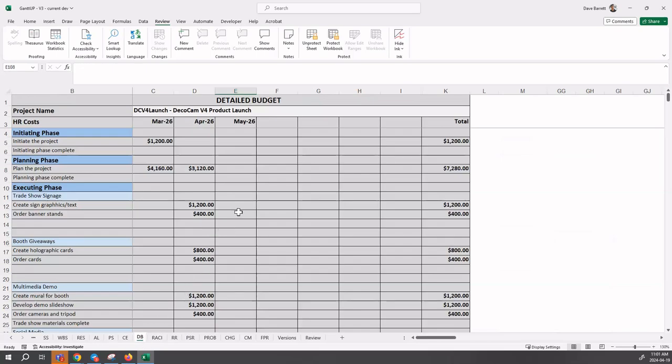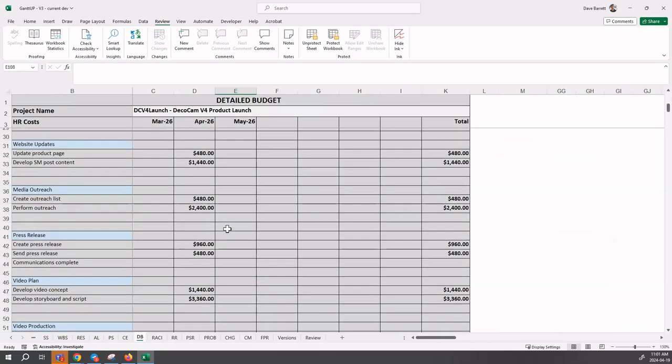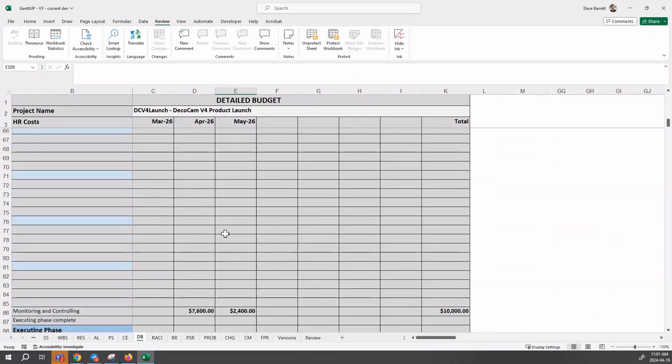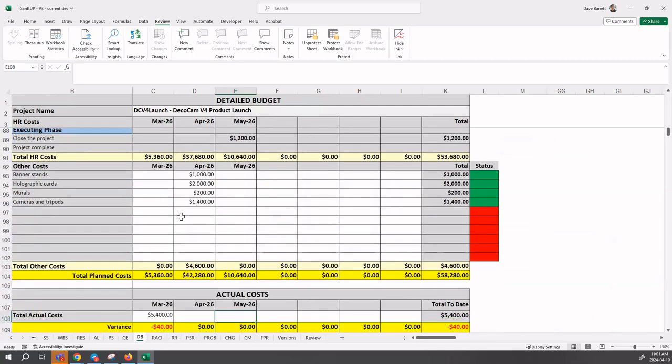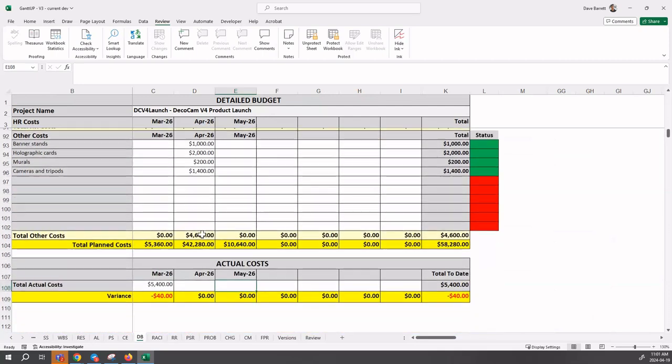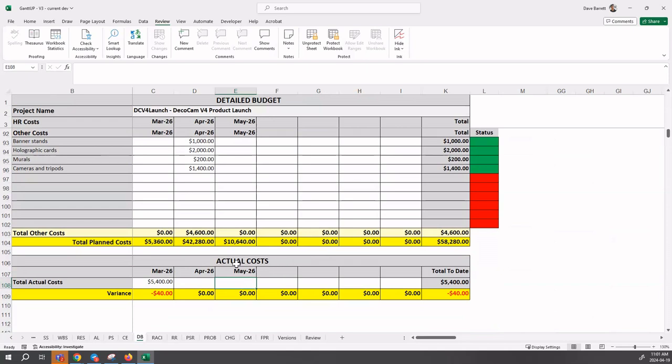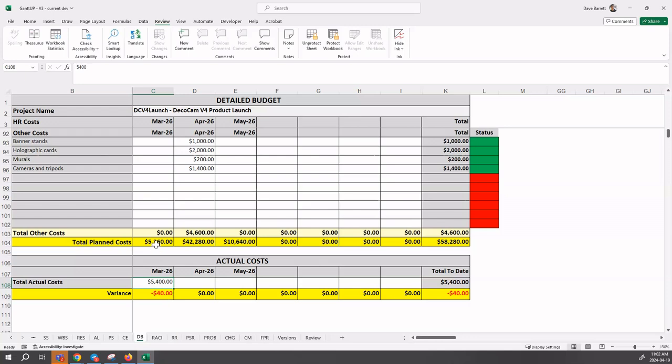That is the approach taken with the schedule. We now move to our detailed budget. We look at our budget and this is the information that we had before. There's our other costs. Now we're going to see what are our actual costs compared to our budget. This is the end of April. In the previous month we had actual costs of $5,400, so that was $40 over budget.